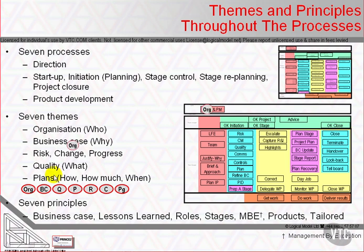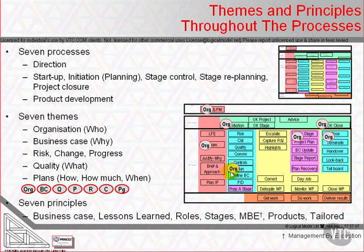Organization starts in starting up a project. The initial element of organization is to appoint the executive and the project manager and then build the team, which is ratified by the project board on their first decision to authorize initiation. Initiation takes a fresh look at who's assigned to what roles in order to create the plans and the strategies, particularly ensuring that all activities that need to be performed have been assigned an owner. As we get to the end of each specialist stage, we review whether we have the right roles and the right people performing them with the right amount of time allocated to them — a periodic refresh at the end of every stage.